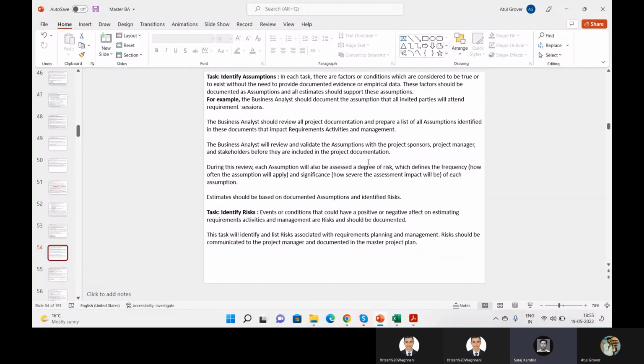Okay. And then when you're doing this part, identify the assumptions as well, very clearly. I am assuming that my development team has access to create a field at the table level. That is my assumption. If they don't have access at the table level, we need to raise a request for the access, and it can delay the development part and that becomes a risk for you.